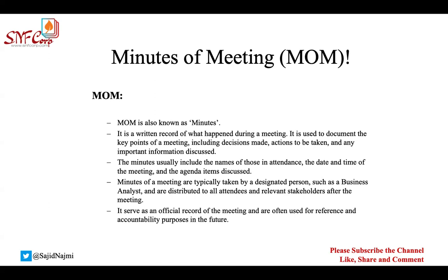So you will also clearly write down what is the action we are taking, who will be accountable for that action, and what is the timeline, when are we going to close that action. So all those important points you will document in MOM.